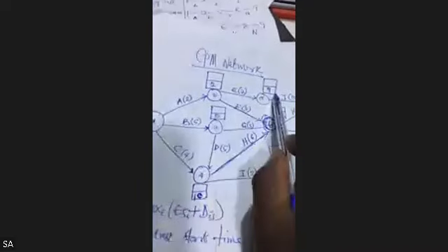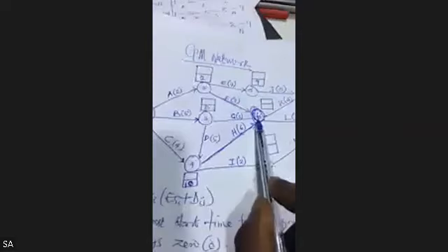For me to get this node, it will be the earliest starting time for this plus the duration of this. 5 plus 5 is 10. So 10 is greater than 0 plus 4, which gives us 4. So write 10. Now I'll go to node 5. From node 2 to 5, activity E, is just one arrow. So add 2 to 7, it gives you 9.